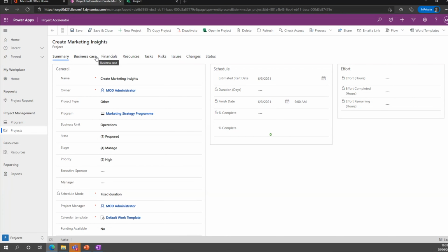It's based on SharePoint using Power Automate. So when you go into alpha, it then adds all your alpha deliverables, or products in Prince 2 terms per se, into that document library for the user to go and complete. And you can get pretty clever with it and say you can't go to the next stage until you've completed all your documents, or until all your documents are of an issued version, i.e. 1.0 or 2.0, or have been approved by the SRO. So you can go crazy with it. But yeah, you can see how hopefully that could work.